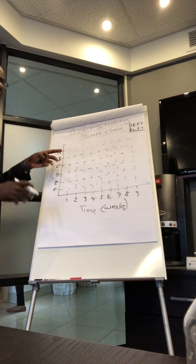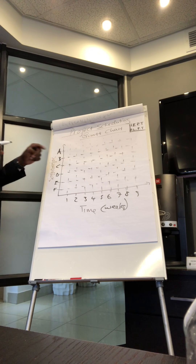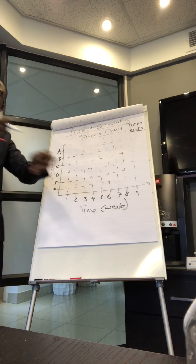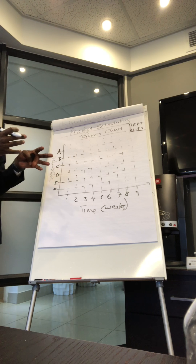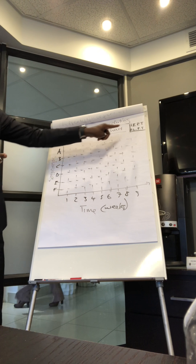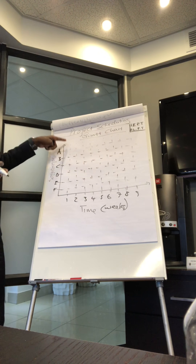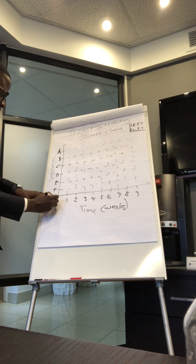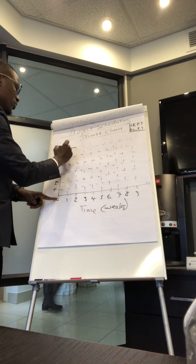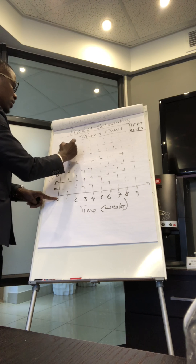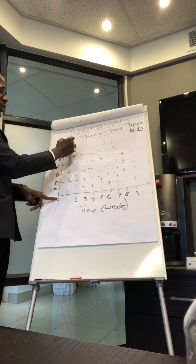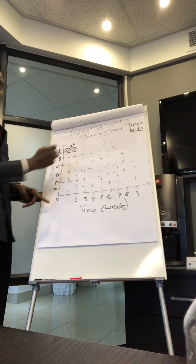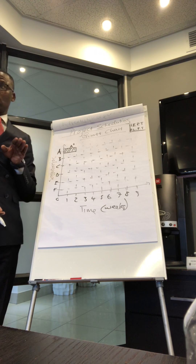Let's assume there is Activity A, or deliverable A, which has no dependence — it doesn't depend on anything for it to start — and it's going to take two weeks. We should start it at the earliest possible time, which is zero. So we draw a bar that is two weeks, and we label this Activity A taking two weeks.